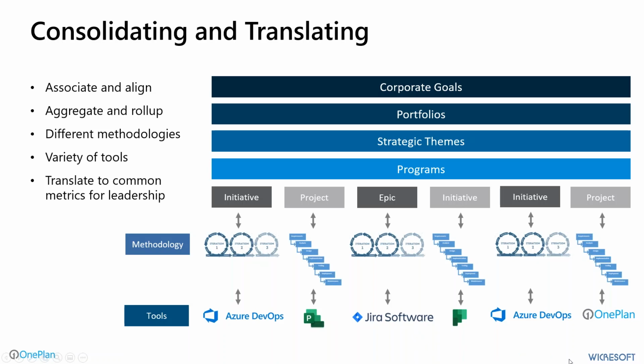Now, from a top-down approach, where you fund and track these costs, whether it be at a project level, a program level, or a more portfolio level, the idea is that some of that information is going to be entered at certain levels, or some of it may be rolled up from lower levels, and so we can compare and look at things as how they aggregate through. So this consolidation and translation must happen on a consistent basis, and you need to have a tool or a mechanism to do that. Otherwise, you're probably doing manual mashups of data from a variety of spreadsheets and tools, trying to consolidate that into a form and format that turns into meaningful information. We would like this to be a more natural output of the process rather than a data gymnastics exercise.